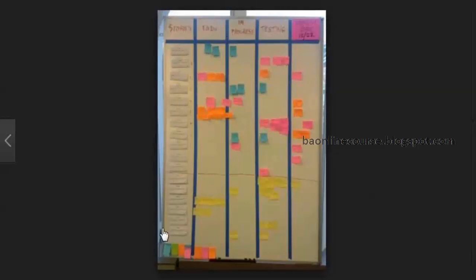So these are all the user stories, and these are what you need to do for this particular sprint. Then you pick them up and work on the in-progress ones, which means they are already in progress, whether in requirements, design, development, or testing. Once everything is completed, you move it here, which means it is available for testing by the customer. So the sprint ends on this particular day, and whatever features are completed, even testing, you move it here.